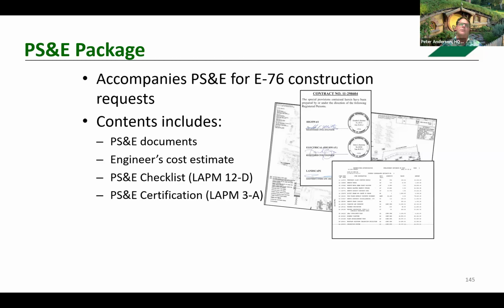They reached out, after the bids came in, to some of the people who were interested in bidding on it but did not. Why didn't you bid? Well, they were basically saying it's a small project. It's very, very rural, away from things, mobilization and all these things are going to be expensive. And it just wasn't worth our time to work on a project like this.